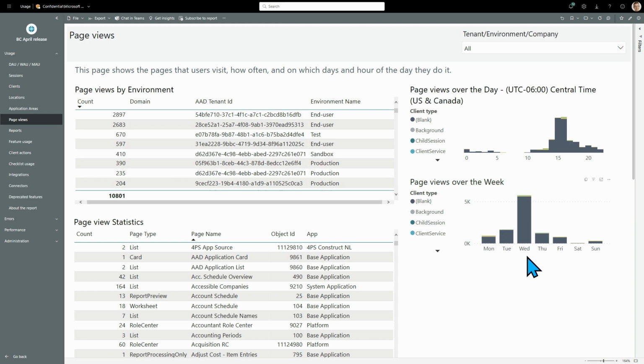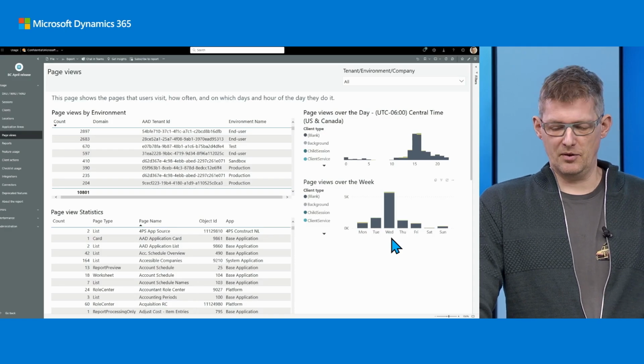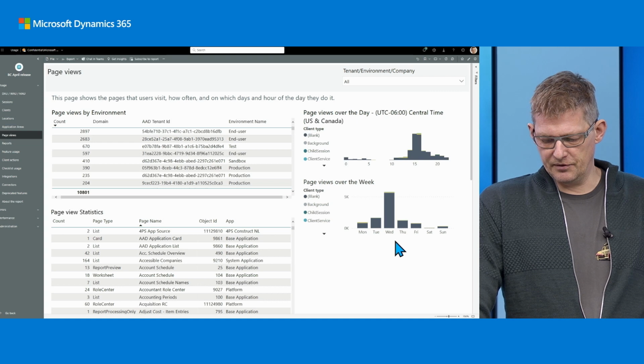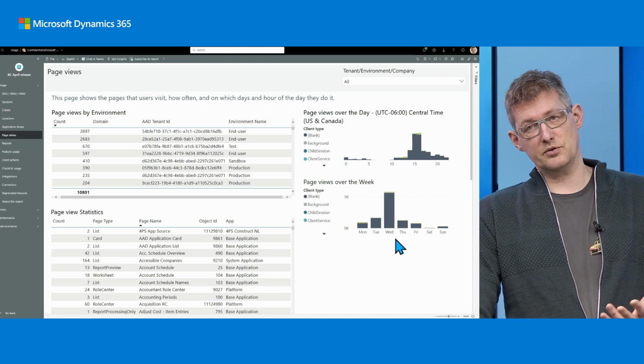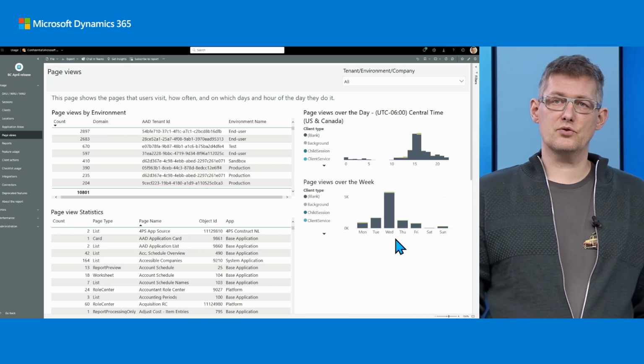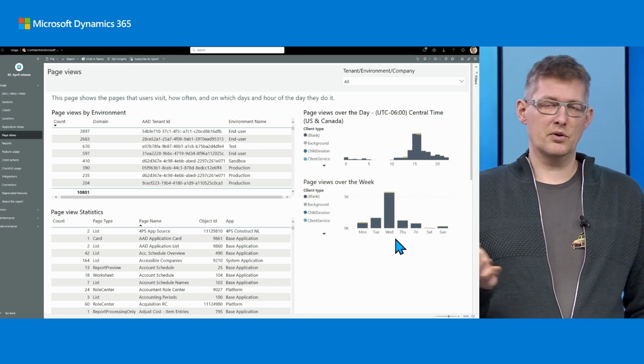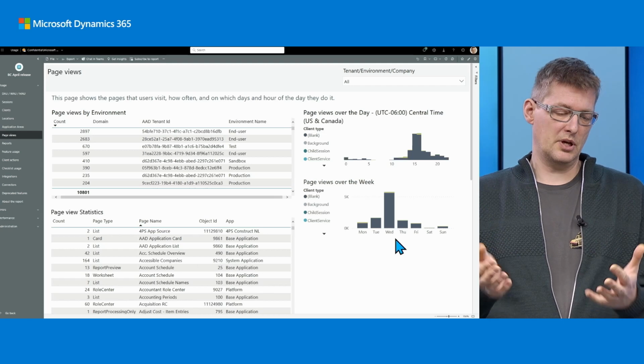This is great if your test was planned for Wednesday. If your test was planned for Monday, it means people were delayed. So it's easy to see that. Again, no need to write and ask for status reports, just use data.